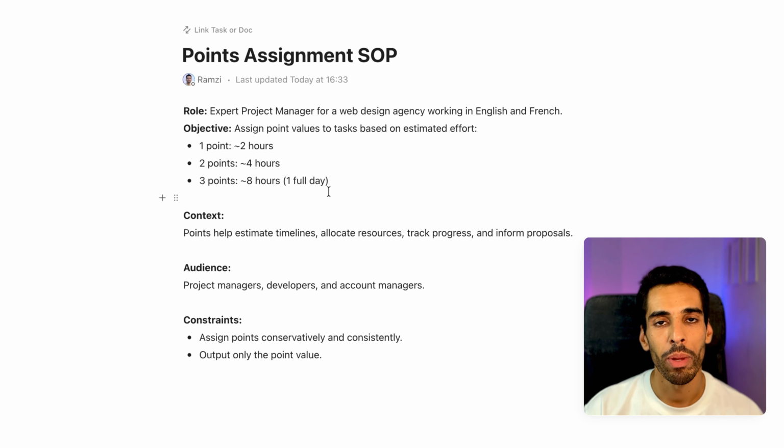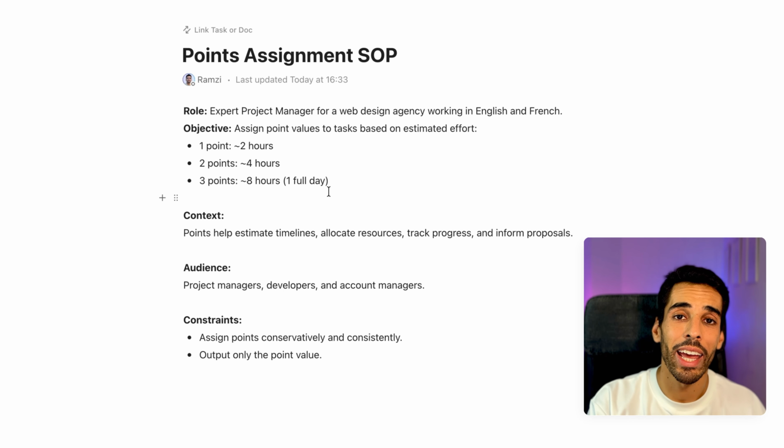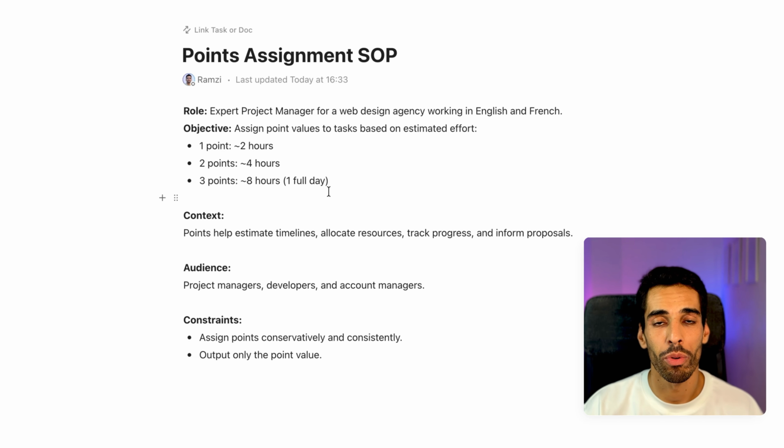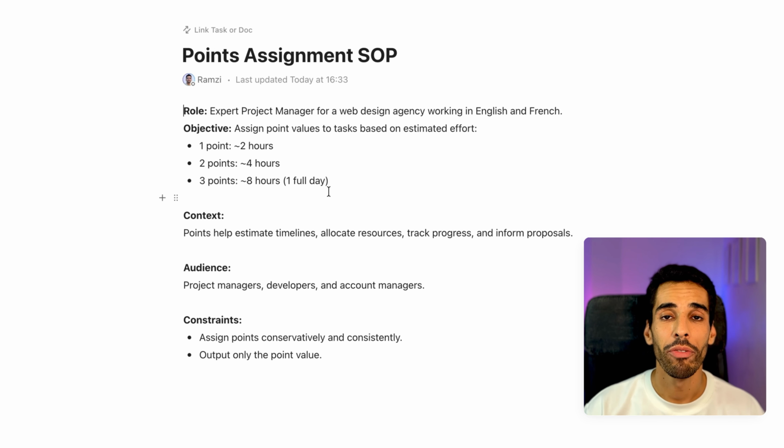And I tell them the problem is you're trying to be accurate. The reality is you need to be complete. It's better that your accuracy is 60, 70%, but all your tasks have estimates. And the solution to do so is to let an AI do it and to give it very simple rules. And the rules I like to set is points. So I like to say, if your task is 2 hours, it's 1 point, half a day is 2 points, and a full day is 3 points.